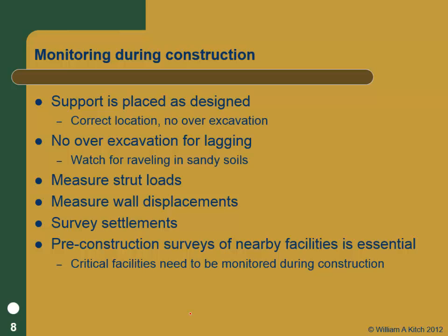So if you're doing this kind of stuff near critical facilities like that, you should be doing this, and you make sure that the cost of doing that is in. You can usually go to the owner and convince them they should do it. In some cases, the owner is telling you that you have to do it. In this case, the owner of the subway says you've got to do that, or they really won't let you do the excavation. And again, that's just more revenue for the firm, and it's fun and exciting stuff. You end up having to hire some geomatics kind of guys to do that work for you.